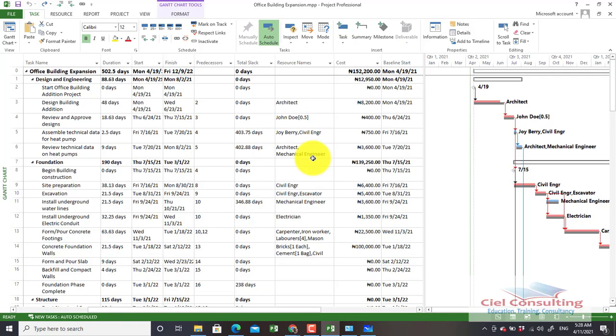So sometimes this report can be done in Microsoft Project that they send to you, or they probably do it in an Excel, or you have a timesheet. So all of these are various reporting formats that you can actually use to gather data for your update now as a scheduler. So this is where the work really is. This is where you now need to begin to input the actuals as the work is being done.